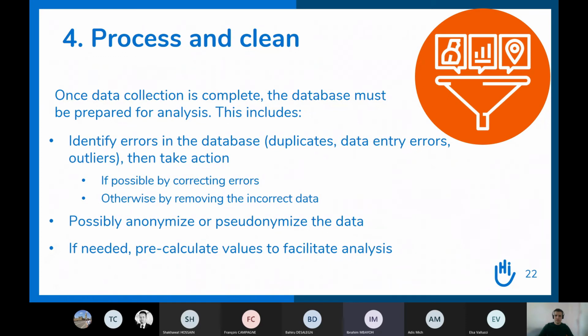We spent more than a month trying to correct some errors. It even went to a point that we had to send our staff into the field to cross-check the information and get some information again. What I'm trying to stress is that at the point of data collection, if we had put more emphasis on the quality check, that would have prevented us from spending so much time on the data cleaning process. That's just what happened to us. From that, we learned, and in the subsequent years we were able to do a better data collection, and we were able to finish the process in time.